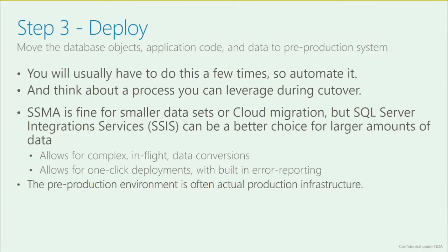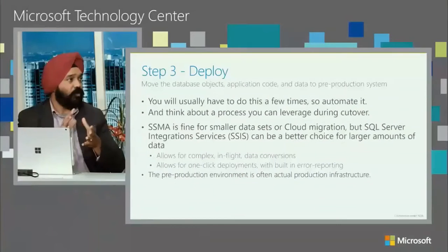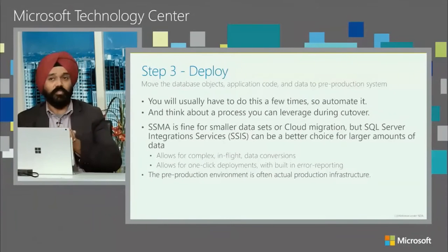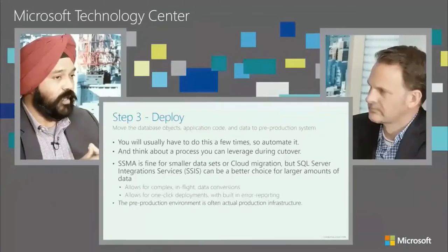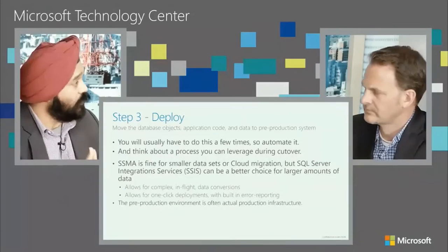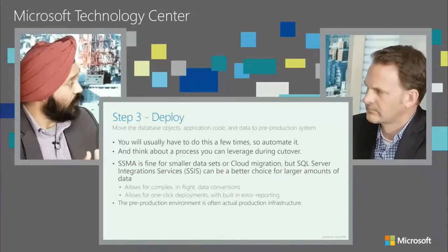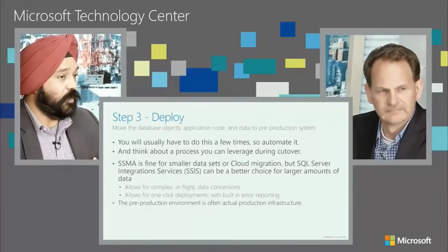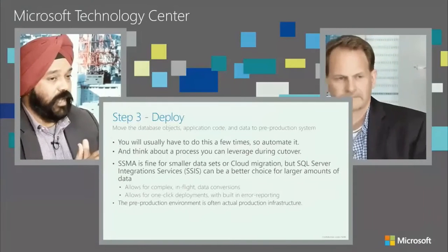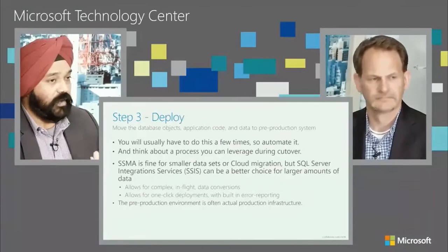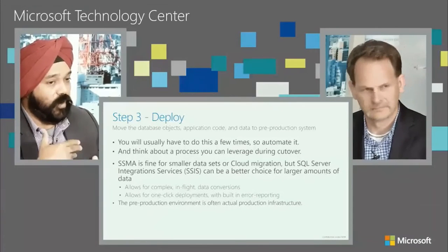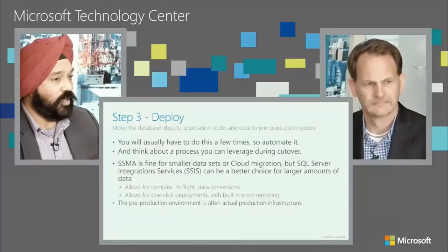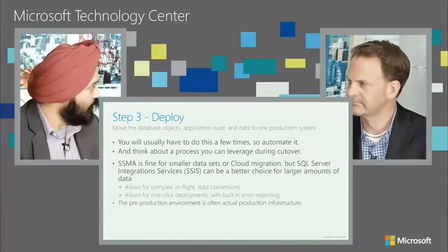And this is where, Kevin, I would say that the SSMA tool is going to play a key role, because this is where you're actually going to run the tool and identify all of the components that you'll have to manually convert, that SSMA may not be able to convert automatically. And so you can start planning to address how those components will be migrated manually, who's going to do what, and assign those tasks, and also deal with complexities that are a part of the data conversion or building out the pre-production environment for the migration itself.